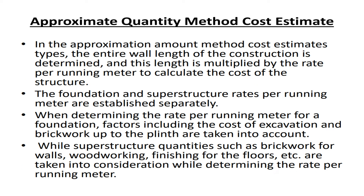Approximate quantity method cost estimate: In the approximate quantity method, the entire wall length of the construction is determined, and this length is multiplied by the rate per running meter to calculate the cost of the structure. The foundation and superstructure rates per running meter are established separately. When determining the rate per running meter for a foundation, factors including the cost of excavation and brickwork up to the plinth are taken into account. While superstructure quantities such as brickwork for walls, woodworking, and finishing for the floors are taken into consideration when determining the rate per running meter.